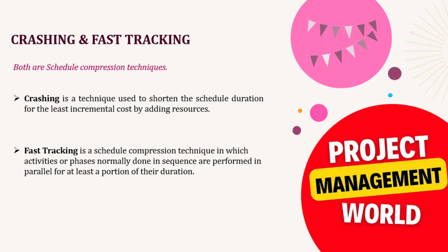So if you see the screen, crashing is a technique used to shorten the schedule duration for the least incremental cost by adding resources. So adding resources is the key word here. So what we do is add resources in crashing.